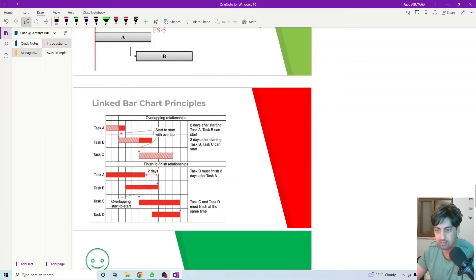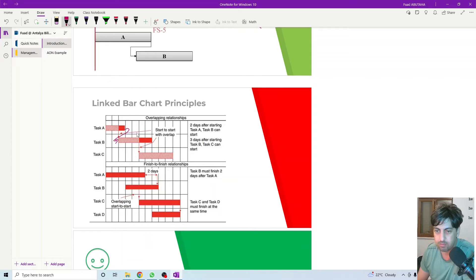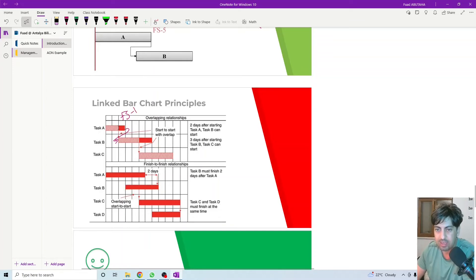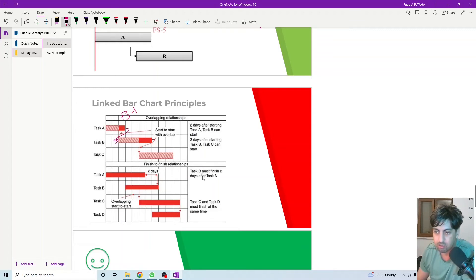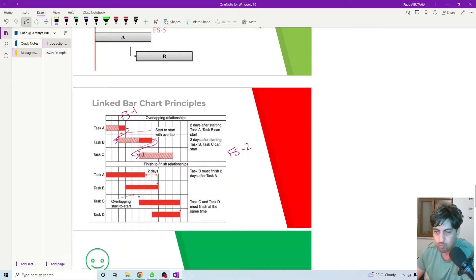If we apply this to the Gantt chart with positive or negative lags: activity A and activity B with a finish-to-start relationship — if it is finish-to-start minus one day, then activity B will start one day before the end of activity A. For activity B and activity C linked finish-to-start, the relationship would be finish-to-start minus two, so activity C will start two days before the end of activity B.